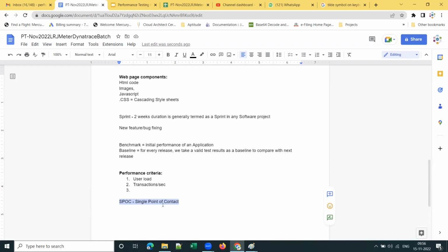Sometimes in some projects, you'll have the daily stand-up call in the evening. In stand-up calls, your manager will interact with you to know what you are working on, any blockers, what you achieved today, and what you are planning for tomorrow, right? Or if you have a morning stand-up call, we'll discuss what we did yesterday and what we are going to do today. Okay. Everyone should be technically sound, and everyone should speak out in those meetings.